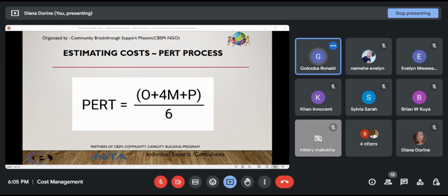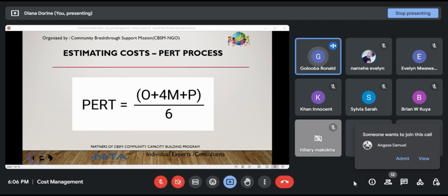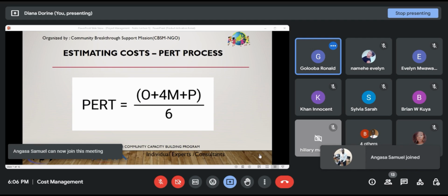Now, when it comes to cost, with the cost, your optimistic estimate would be that within the first quarter, which is 3 months, we shall use around 20,000 US dollars. But most likely we may spend around 22,000. That is if the period takes 4 months. And the pessimistic estimate would be that if we take on 5 months, then probably spend around 26 or $27,000. So you're able to use that information to calculate your estimate